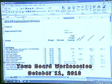Well, I don't think we were wedded to that particular form, but we were wedded to making sure that we knew that the steps were going in the right order and that we didn't skip steps. We didn't end up applying for a grant before we approved a project, that sort of thing. We can't be doing that kind of thing. So that was what those steps were trying to make sure we did. I don't think this prevents that level of detail. So either it needs to have a bunch more columns inserted, or we need to split the form.